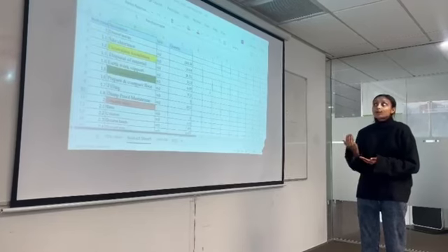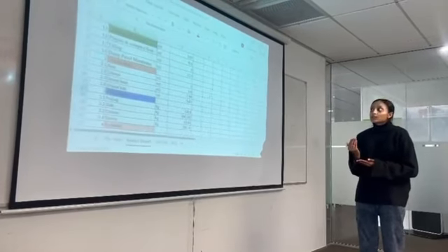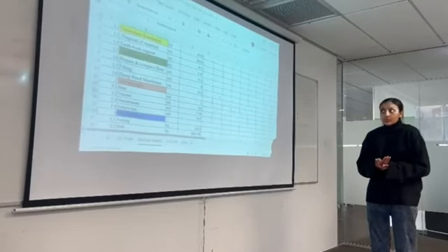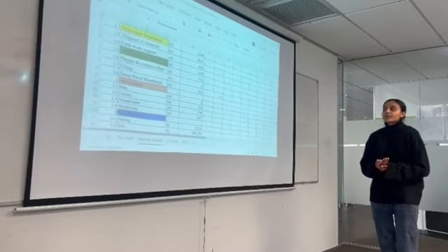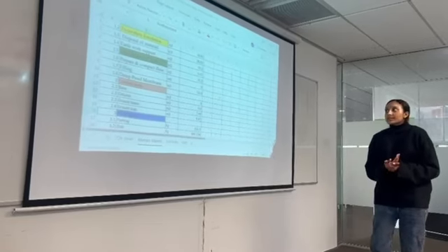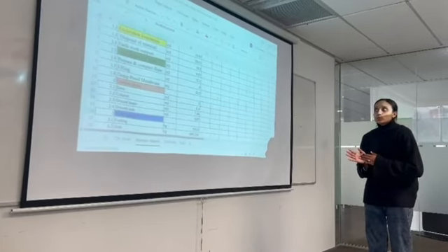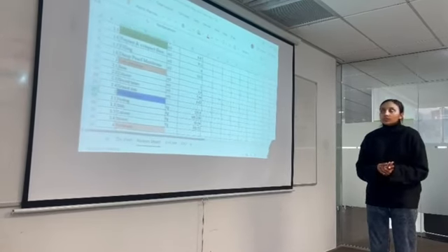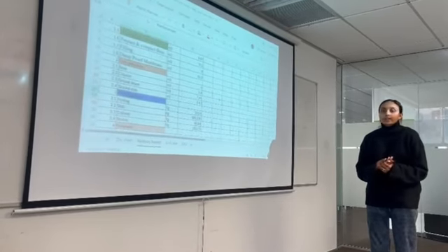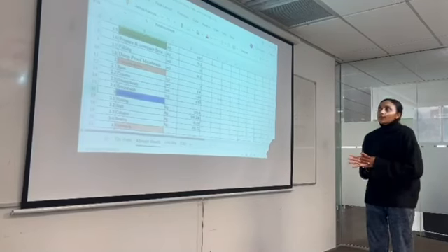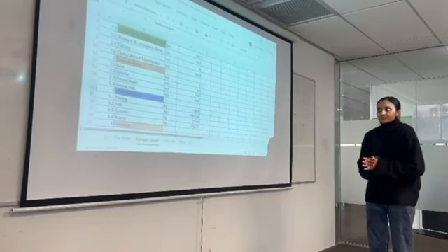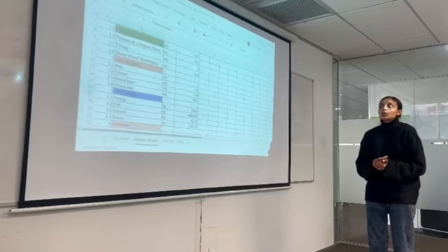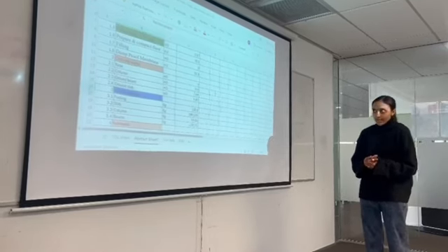The next is earthwork support, that is also square meter, the quantity is 9.67. The next is prepare and compact floor, that is also square meter, the quantity is 70.2. The next is filling and damp proof membrane, the unit is cubic meter and square meter and the quantity is 48 and 53.3. The next one is concrete work, in which the base, column and ground beam and ground slab.